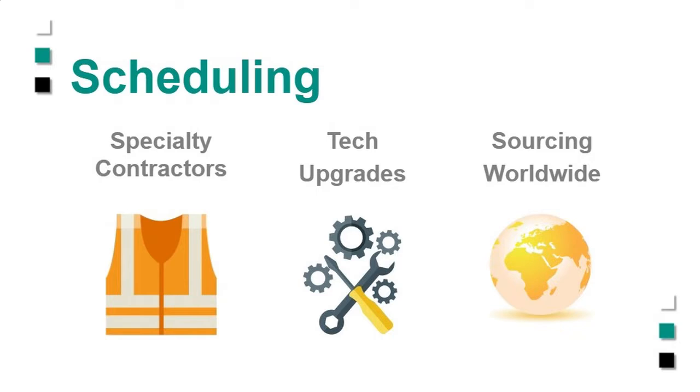I'm going to ask another quick question. How often do you do your updates? Of course, it's going to depend a bit on your project, but what we're striving for is frequent updates. If you're in a large capital project, weekly would be awesome. Lots of our capital project groups still do monthly. Some are at every 2 weeks, which is an improvement, but many are still at monthly, and we're trying to drive it so they can get to weekly at minimum.